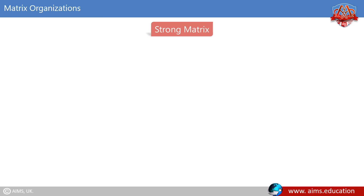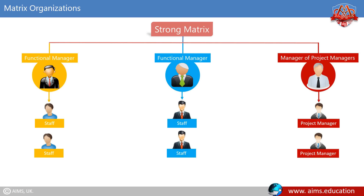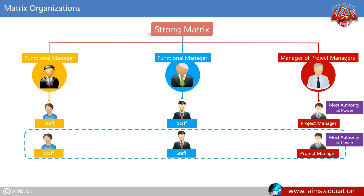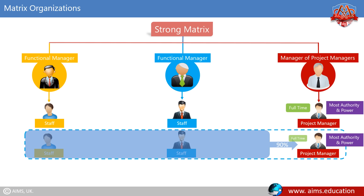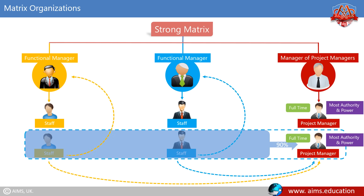In a strong matrix, most authority and power lies with the project manager. The percentage of people on the project team assigned and dedicated to a single project may run as high as 90%. The project manager is assigned full-time and has a full-time support staff; however, the support staff still have dual reporting lines, reporting to both their functional managers and the project manager.